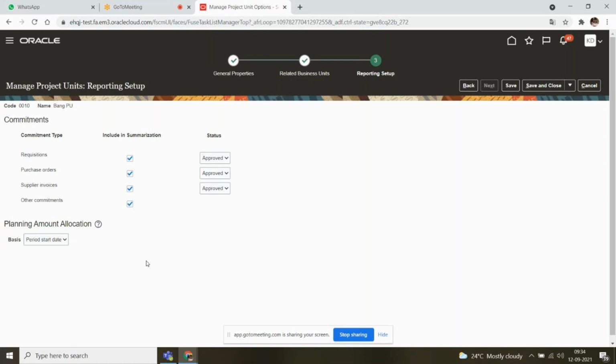In order to import all these commitments into the project side, you have to run the update project performance data job. This is very important. It is one of the activities done by update project performance data. Importing the commitments is one of the duties. That is not the only duty done by the update project performance data job, but this is one of the duties done by that particular job.